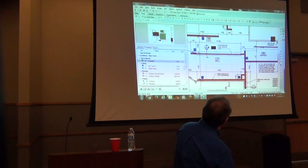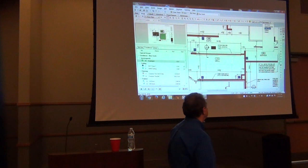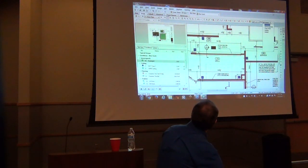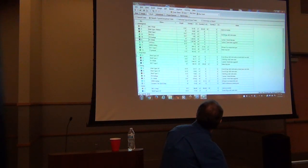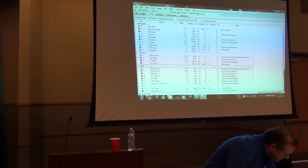Now, I also did some takeoff in this project that is over here on the right. You'll notice dining area, admin, and prep. Now, bid areas can matter a lot. If you have clients or owners that say, how much are we paying, or what's in the dining area? Well, if I go to this takeoff tab, there's my dining area right there. There's all the quantities I need to know, from there down to here.